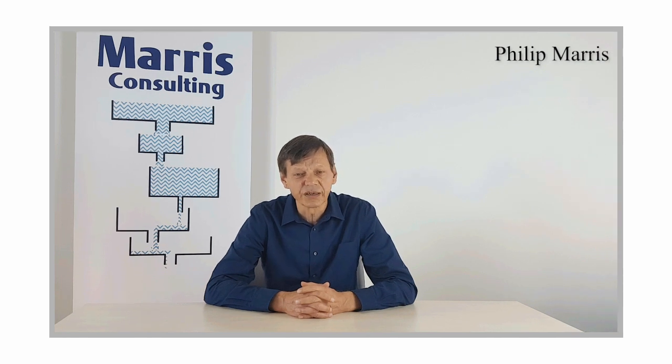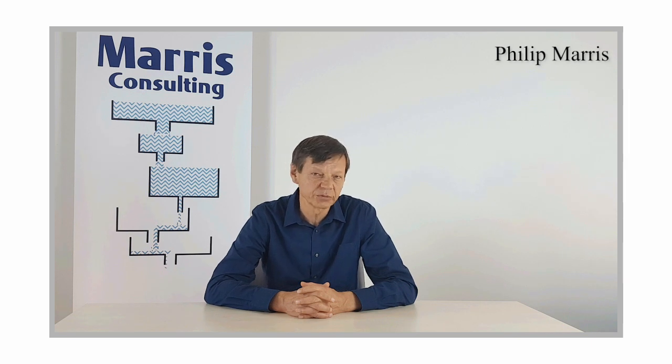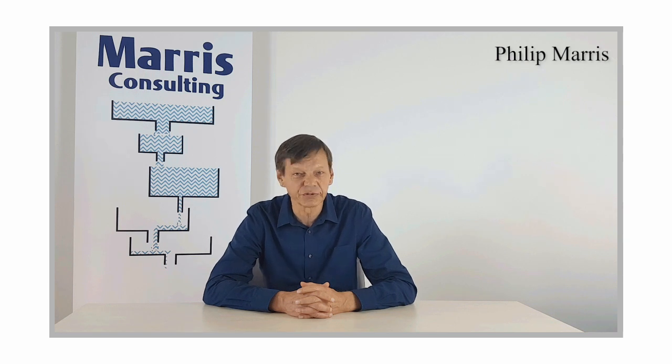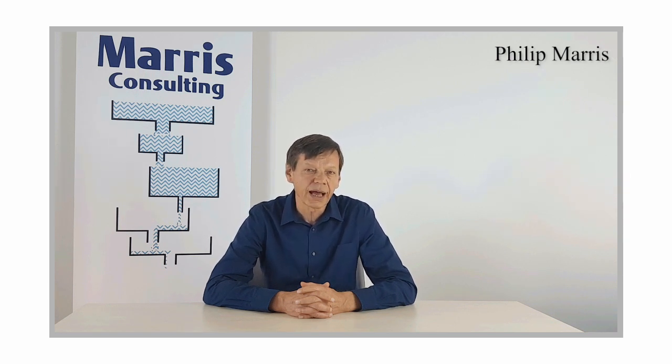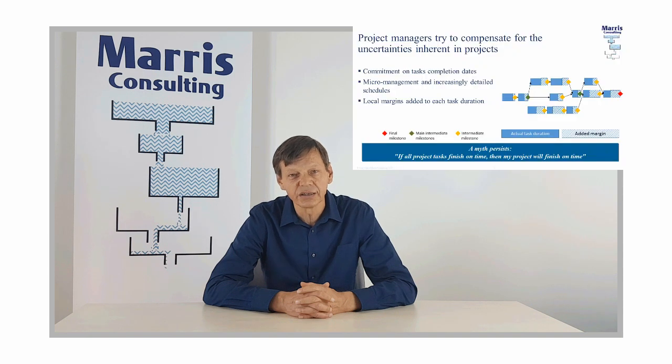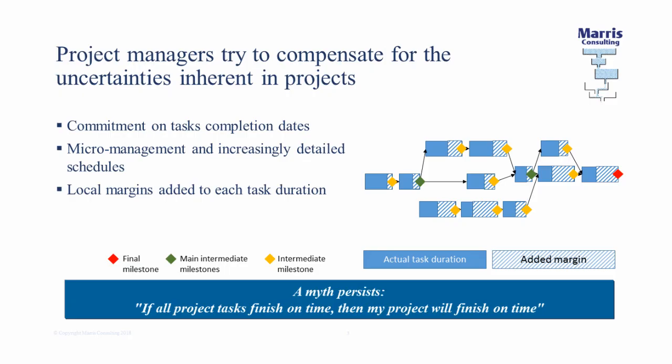And why is that? When these projects have been broken down into elementary tasks, you've got a work breakdown structure with 10 tasks for a simple project, 100 for a complex one, or 10,000 for a very complex one. And in each of these individual tasks, we've added some safety buffering time. So we have a sequence of tasks, each of which has some safety, and yet the project will finish late and go way over budget and all that. So let's try and understand why that happens.